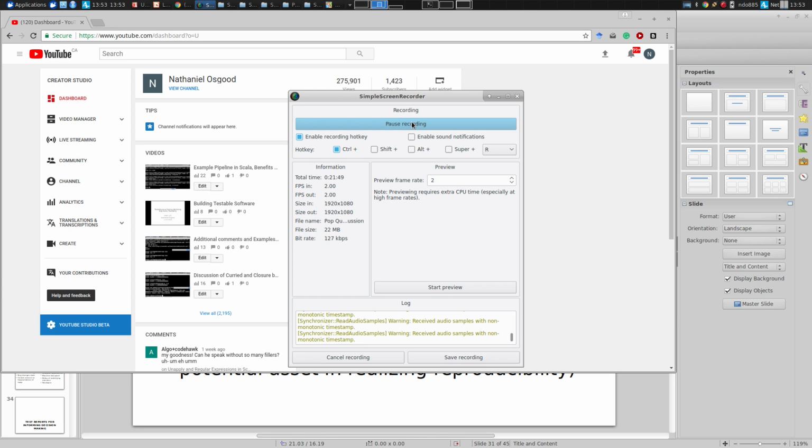Function of risk scanning. What are you doing in risk scanning? What's going on in risk scanning? Identifying things that aren't a problem now but could be soon. Good. Identifying. I like how Eric said it. Identifying things that aren't problems yet but could be soon. Today's risk is tomorrow's problem if we don't attack it. And remember, was it Tom DeMarco or Jerry Weinberg that said, if you do not aggressively attack project risks, they will aggressively attack you. Okay, and history suggests it's true.